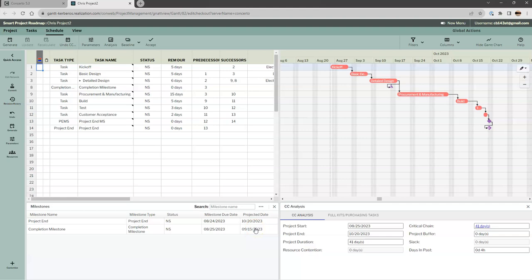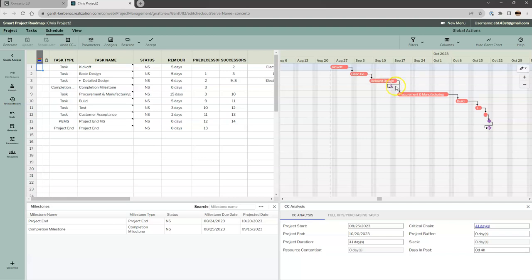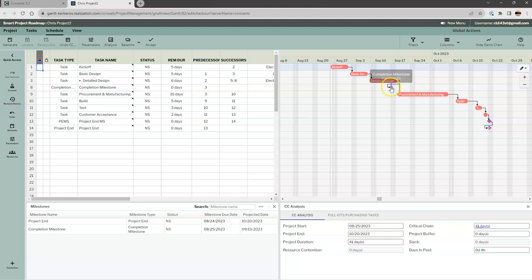That enters the contractual milestone at the end of detailed design. This becomes a mini project: basic design and detailed design lead into a milestone. Let's run generate schedule, and we'll see the actual projection — the completion milestone is going to be September 15th. So it's about three weeks from today. When I insert buffers, we will also buffer to this contractual milestone.